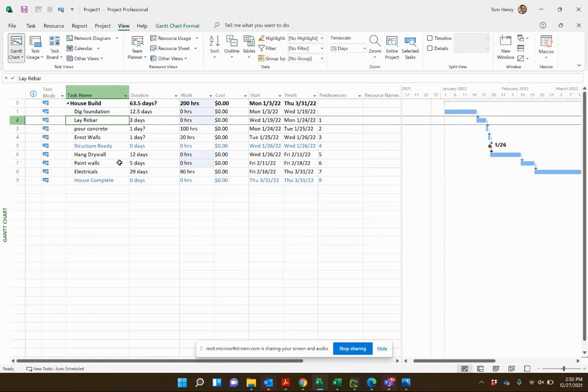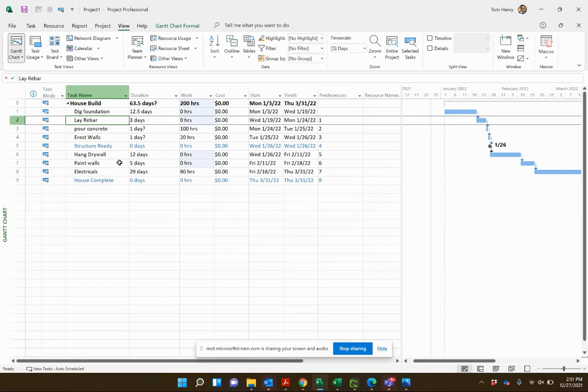Work resources are people or things that we prorate over time. Cost resources are used to model fixed costs within your project, and material resources are used to track the materials that you're leveraging for your project on a unit-by-unit basis.